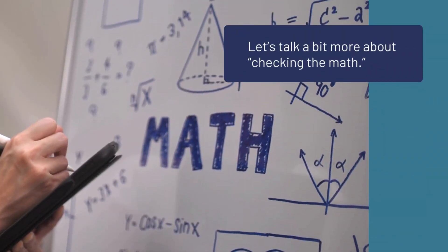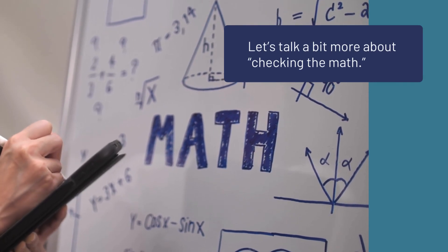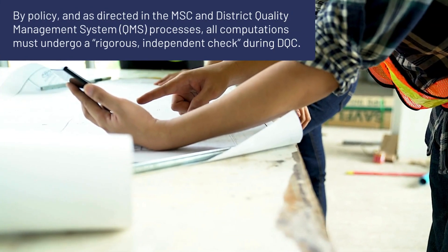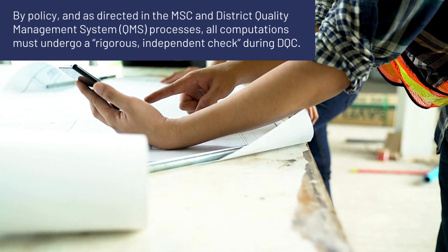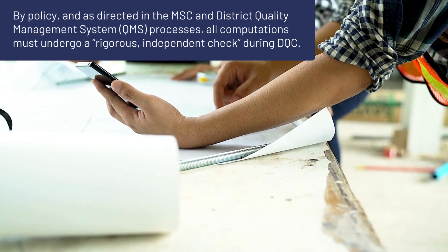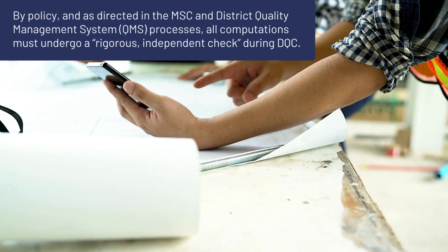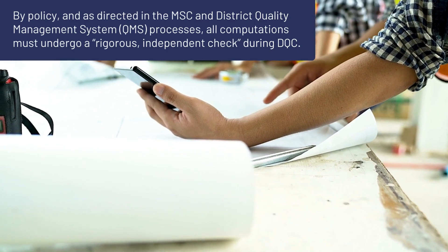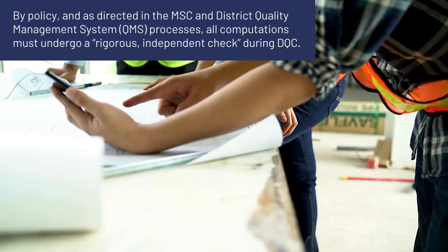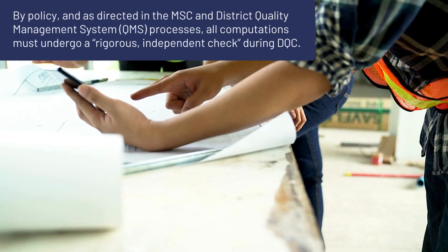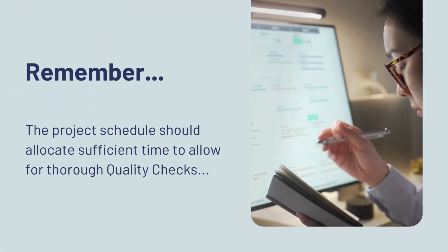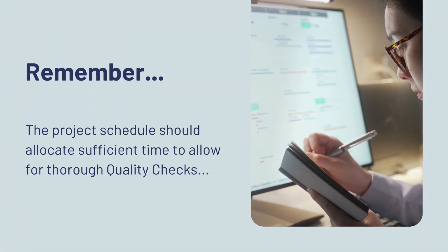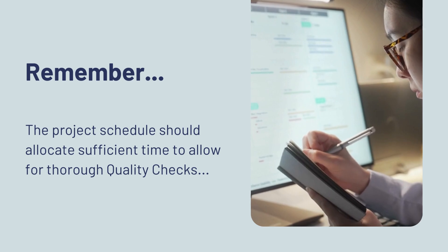Let's talk a bit more about checking the math, because that part's pretty important. By policy, and as directed in the MSC and District Quality Management System, or QMS processes, all computations must undergo a rigorous independent check during DQC. Remember, the project schedule should allocate sufficient time to allow for thorough quality checks.